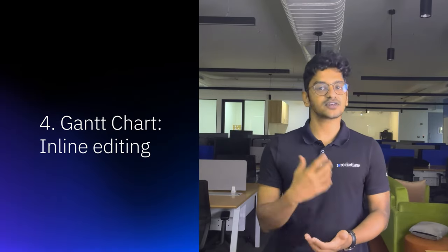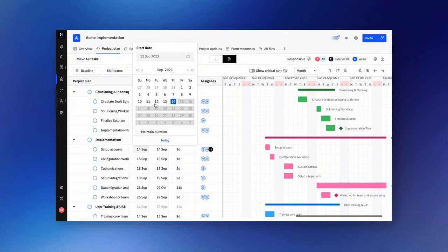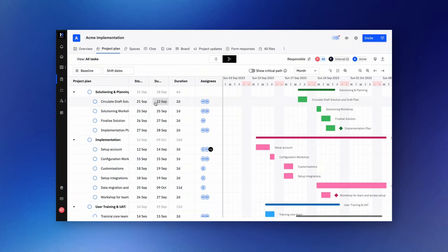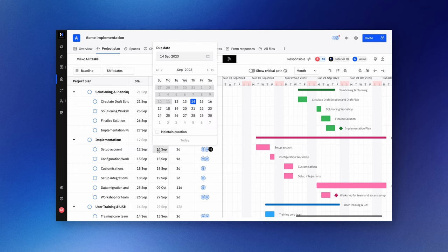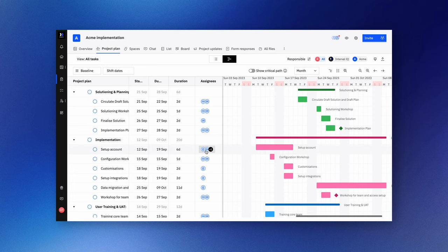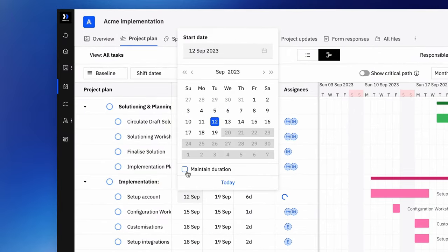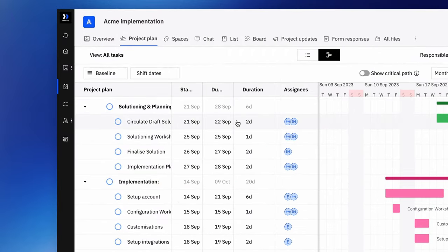Next up, we've also made a couple of really interesting enhancements to our Gantt charts. You can now effortlessly refine your project plan in real-time using Rocketlane's Gantt chart. Our inline editing feature allows you to adjust task details directly within the timeline view, which means you can update start dates, due dates, durations, and assignees easily. If you need to modify start or due dates while preserving task durations, simply choose maintain duration and make the adjustments. This enhancement is all about facilitating dynamic changes to your project.